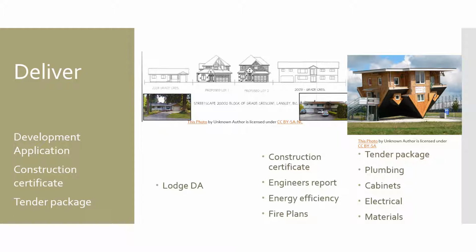Now, while you're waiting for the DA to be processed, Brett will start to work on the construction certificate. The construction certificate will involve an engineer's report, fire plans, and an energy efficiency plan. As he's filling out those forms, he'll be toing and froing with an engineer.